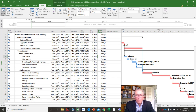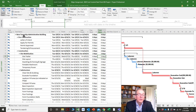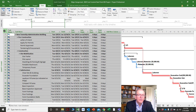Any activities with zero float — as soon as I change a duration on them, my project will take longer. That's why they're indicated in red for the critical path.